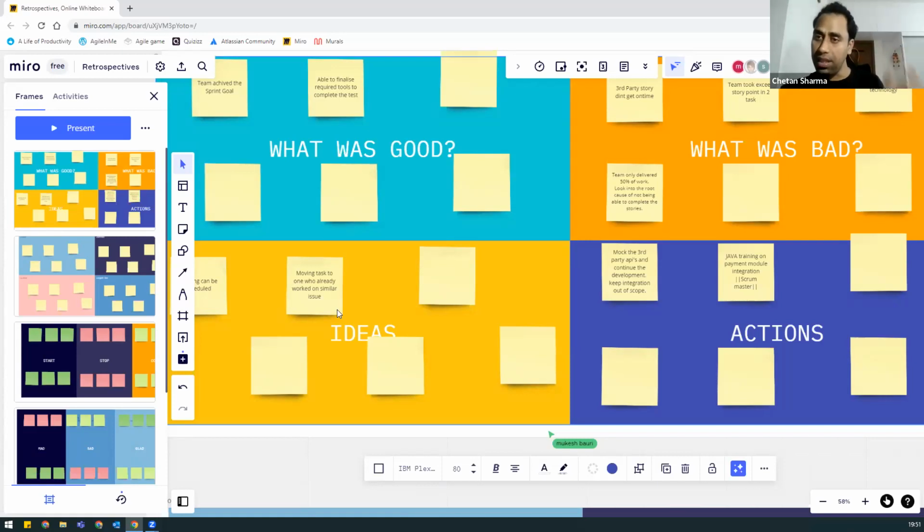Let's schedule that within the sprint, a 30 minute or 1 hour session. And then when we are having our next meeting, which is the sprint planning meeting, because our training is done, the team members also get an idea how they can work on this new set. Now they are more confident to re-estimate the story. Now they know how much time they really need. They can say, we got the training, but still we feel, because we will be doing it the first time, it's a risky part. So instead of 3, we want to take it 5. That's one thing we can do.